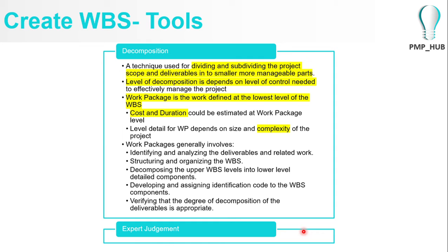Since you have a limited budget, you put up the ground floor first, and maybe next year you're going to do the upper floor. So phase 1, ground floor. Then we start dividing ground floor into foundations, electrical work, windows and doors, and woodwork.